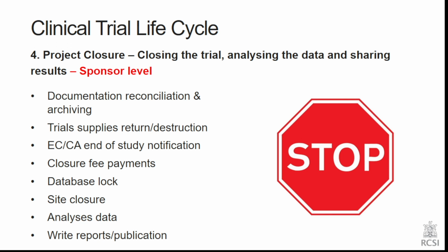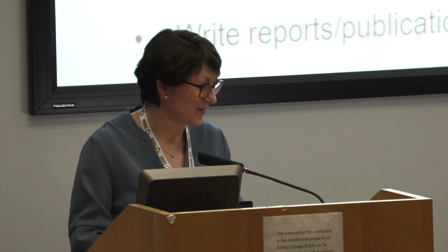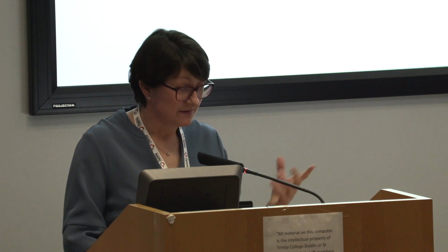You need to make sure that the ethics and competent authority are notified, that all fees are paid up to date. You need to make sure the data is ready for the database lock and that it's closed, and that you carry out a full site closure. And then it's analysing the data and writing up the reports and publication. And again, if you say all that quickly, it sounds like it's no bother, but it's an enormous amount of work. And then when you look at the site level, the project closure, everything from making sure that the documentation is ready for archiving, that the trial supplies are ready for return and destruction, that any local end of study notifications are given, and that you've done your invoices. So you close it all out, and finally you can get to the end from a site perspective.